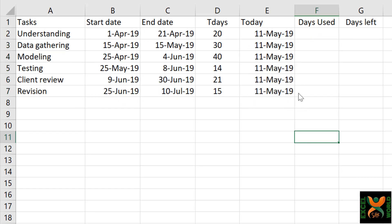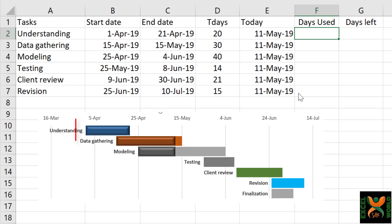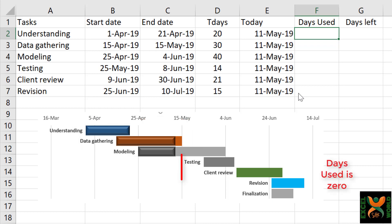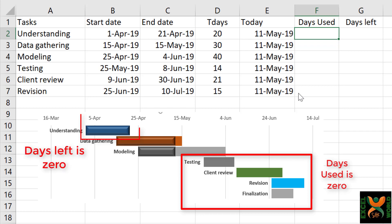Before applying the formulas for days used or days left, we are going to give a hypothetical number to each. I will tell you the reason: because we have to format different bars in the chart, and if the number of days is zero in any case—for example, days used or days left—we may not be able to see the bar and may not be able to format that bar.